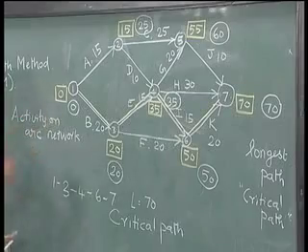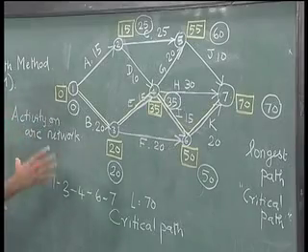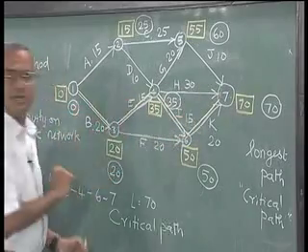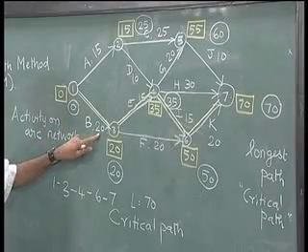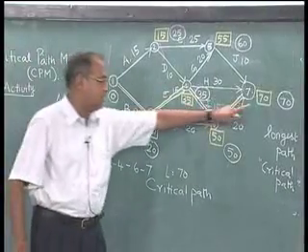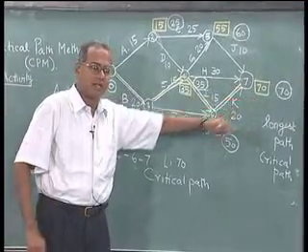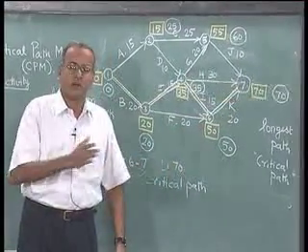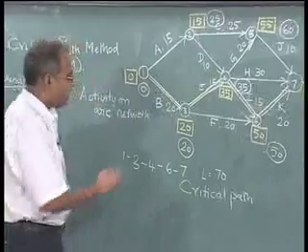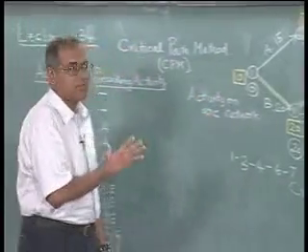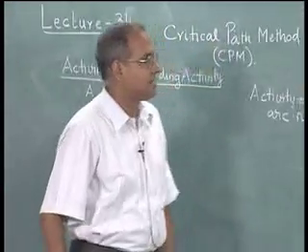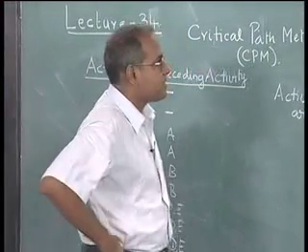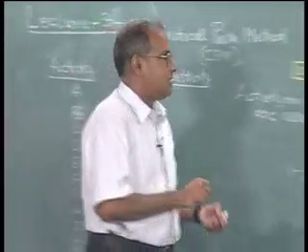We also understand that if there is a delay in these critical paths, by which it takes more than, say, 20 units of time, say 21, then the length will become 71 and the time to complete the project will increase. So, to that extent, the critical path is extremely important, and this labeling algorithm would help us get the critical path. Now, we also need to look at one more thing.